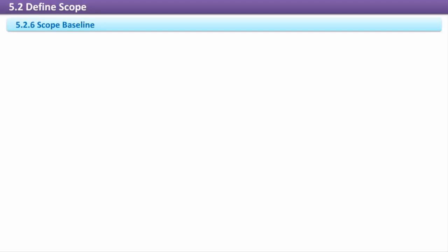Once these documents are approved in some manner, the baseline is created, which just means that any further changes must go through the change control process. Baselines are not the original plans. Though this may seem illogical at first, an example may help us better understand baselines.